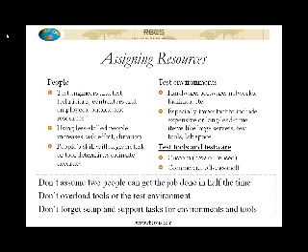And then make sure that your setup and support tasks for the environments and the tools are built into your estimate as well. That's another easy thing to forget. But somebody's going to have to keep the environments up and running. They're going to have to install the tools potentially and so forth.